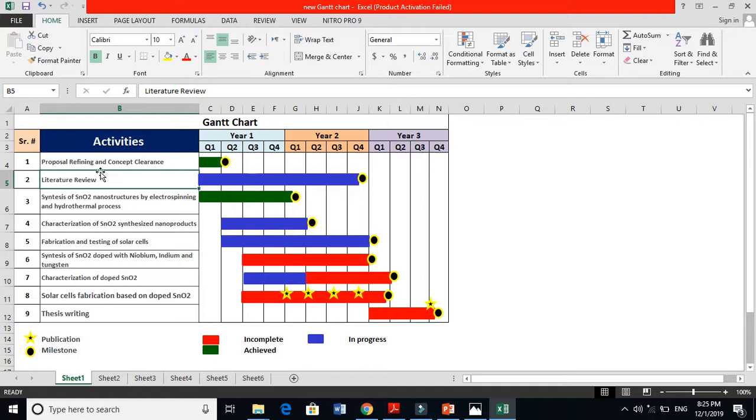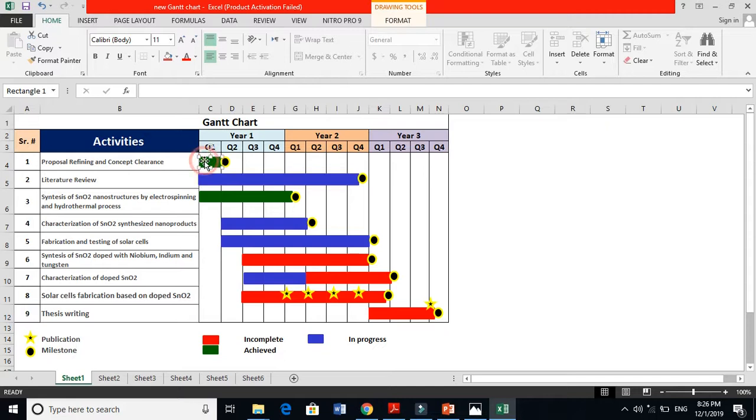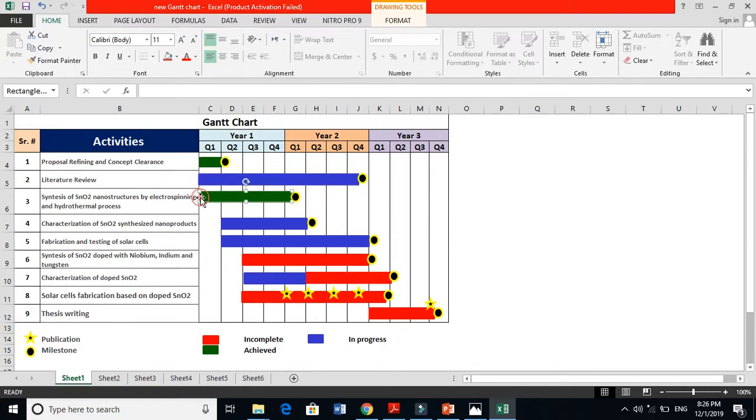For example, I am working on solar cell, so I have to collect a lot of information about solar cell - that is called literature review. That literature review is also continuous from my first year and it is going towards second year. You see it's not going to finish and simultaneously it is with the proposal refining and clearing concept.